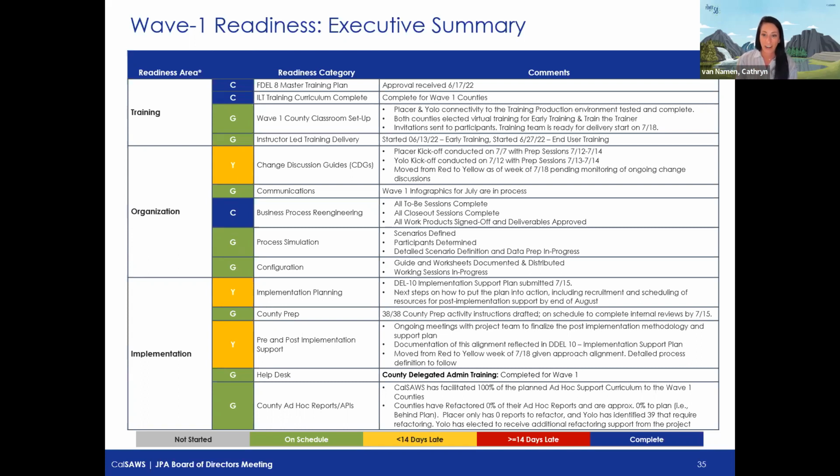The next readiness area that we wanted to highlight for Wave 1 is training. Right now, early learning and train the trainer for Wave 1 counties are underway. The classroom setups and the connectivity, as well as the certification process for those workstations, are on schedule for completion well in advance of end user training that won't begin until September 6th.